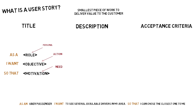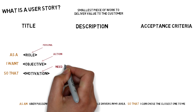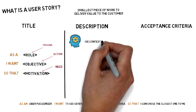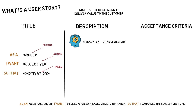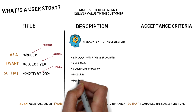We must remember that the title of a user story must map a single functionality of our product or service. The description of a user story helps to give context to that story. It may contain a small explanation of the user journey, some use cases, and in general, any explanation that helps to better understand the title. The description should not be thousands of words, but it should contain any good context that helps clarify what is being expressed, such as pictures or links to the design.